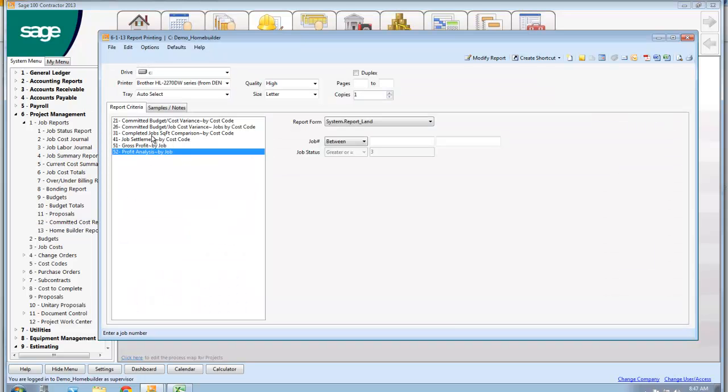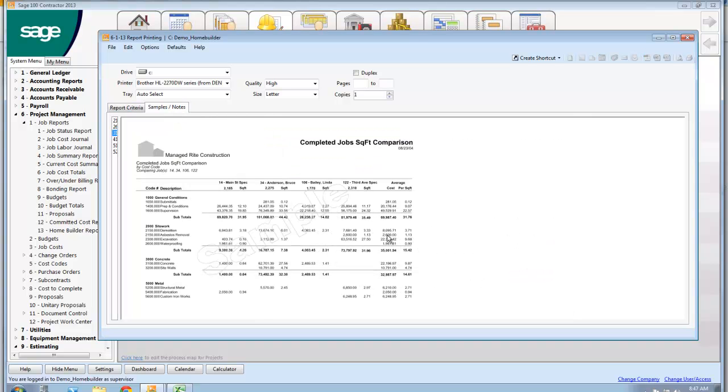The other one I think that's really, really helpful is this one here. Again, it's small print, but you can pick 4 different houses that have been completed, closed. What it'll allow you to do is go into these 4 houses, or 3, usually you use 4, by cost code. So, let's say on here, this line item demolition right here, $21.50. On this house, it costs $3.18. On this house, $6.01. This house, $2.31. This one, $3.33. But on those 4 houses, I averaged $3.71.